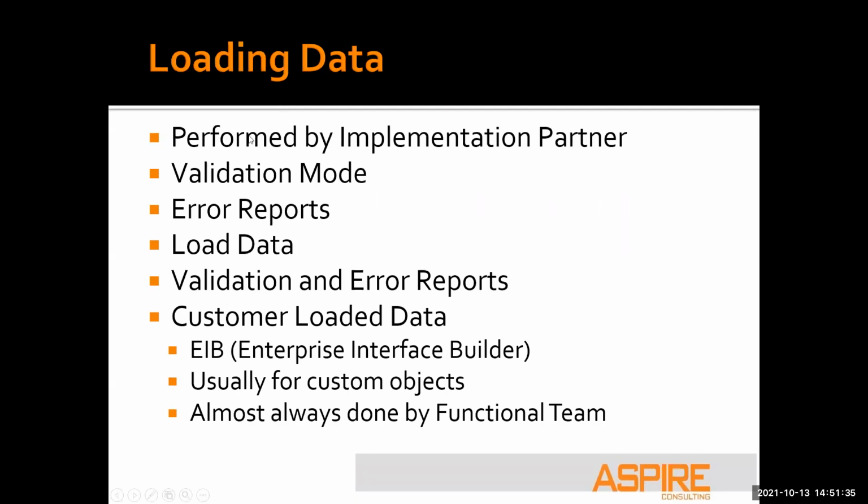Loading data is 99.9% of the time done by your implementation partner. Usually they're the only ones that have access to the tenant that early. They will be the ones to take the files and feed them into Workday. They usually do that in a validation mode first, which means it's not truly attempting to load the data. It's just going through and seeing if it's going to get any errors or anything that kicks out.